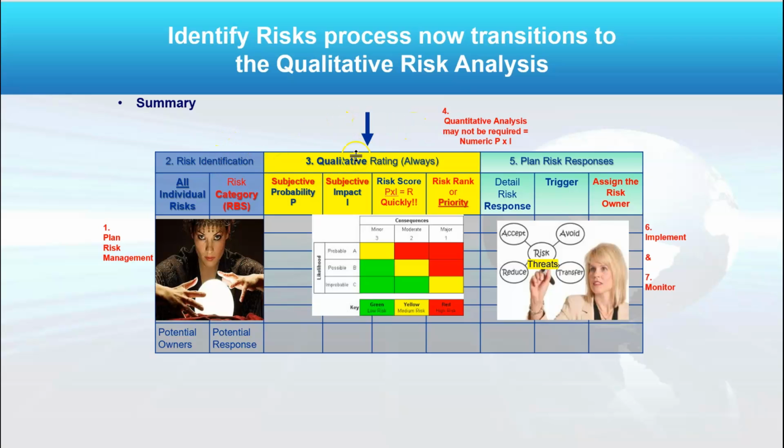Then after that, I will do qualitative risk analysis, which is taking probability times impact, right? And remember, this is subjective probability and subjective impact, but it's by a subject matter expert, so it's pretty good. And I can use color codes to define what are the highest risks, or I could even assign numbers to them, but it's still a subjective risk analysis using qualitative analysis.